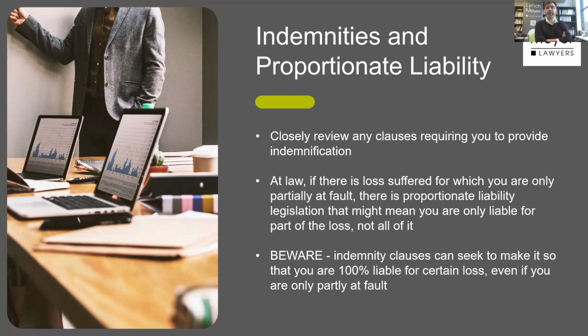Now, another key issue: if you get a Word version of a contract to review or to sign, one good idea is to just do a Control F and search the word indemnity or indemnif, just in case it's indemnity or indemnify or whatever it is, so it comes up with every permutation of the word indemnity.